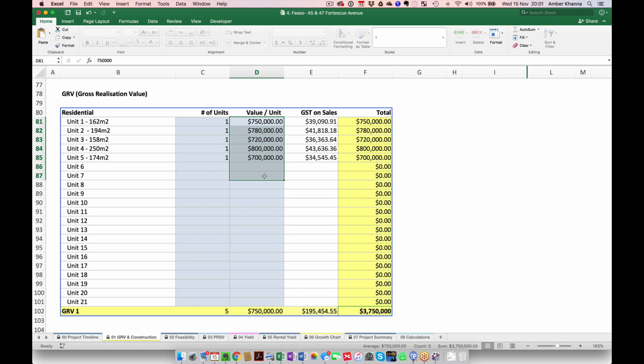Now he might be giving you an inflated figure, because he doesn't have to give that to you in writing. He's just going to verbally say it to you, so take that figure and cross check it with 2 different other agents, and see what the rate is that they're getting as a square meter for something like this. Show them the plan. Say, look, I've got 4-bedders and I've got a 3-bedder, 2-bedder. What do you reckon we can get in that area? Some agents will give you that price. You tell them, I'm buying this property, I just want to get a feel of what the market is at. How much do you reckon? They'll give you those details.